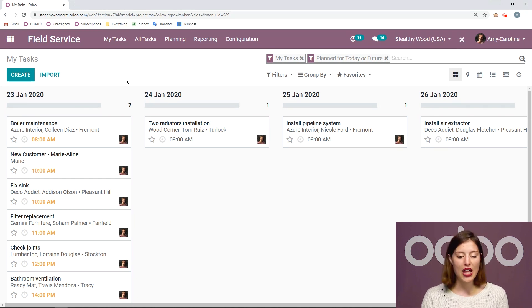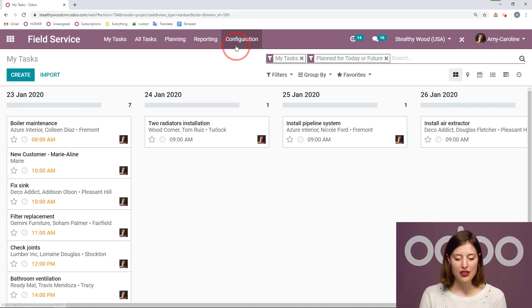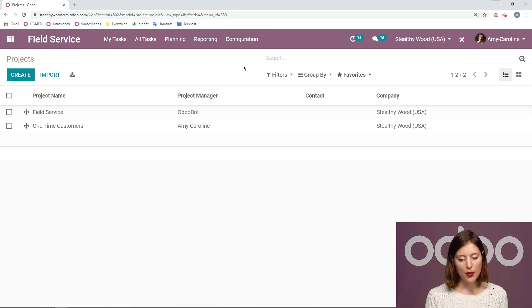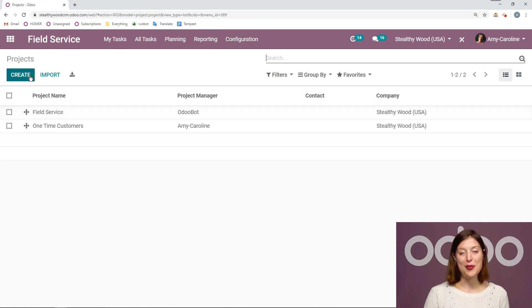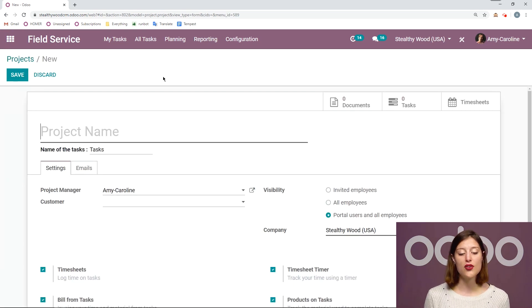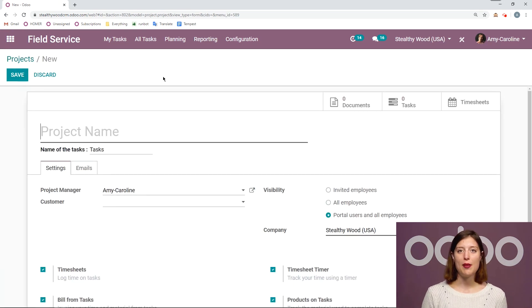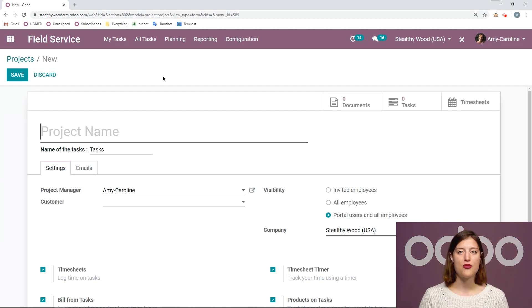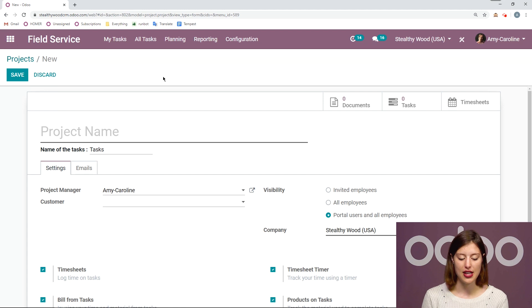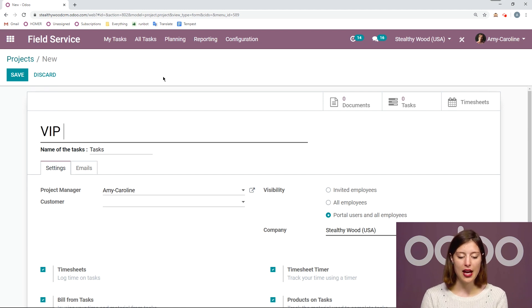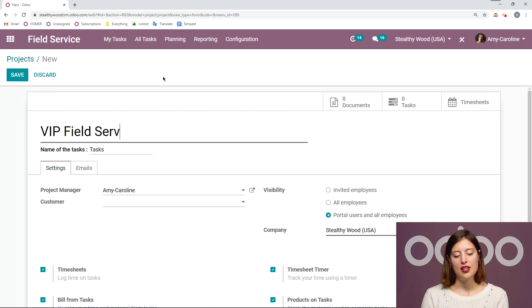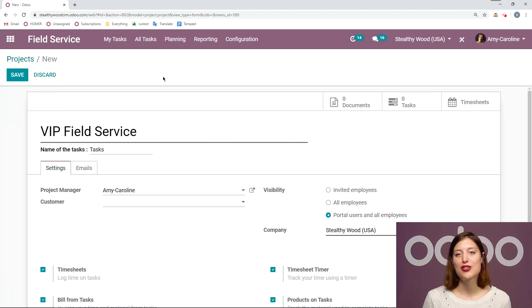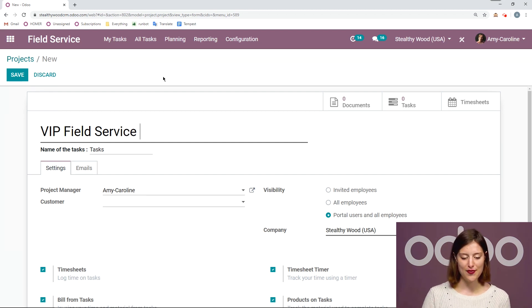But of course, we need to create some projects where we will organize these tasks. So to do that, we're going to go to Configuration, Projects. I already have a couple, but let's create a new one right now by clicking on the Create button. First of all, we're going to need a project name. I might do this for a type of service that I offer, or perhaps for a specific customer, or even a type of customer. So for example, I could put a VIP Field Service. This is going to be for all of my VIP customers, so I need to pay special attention.